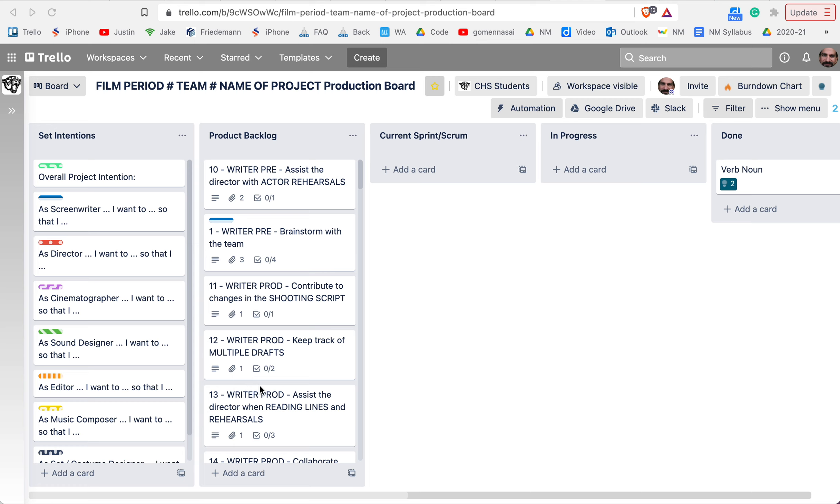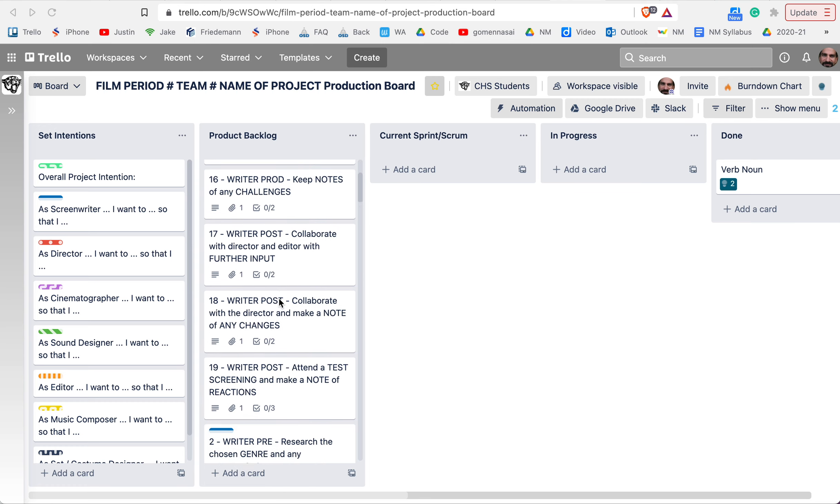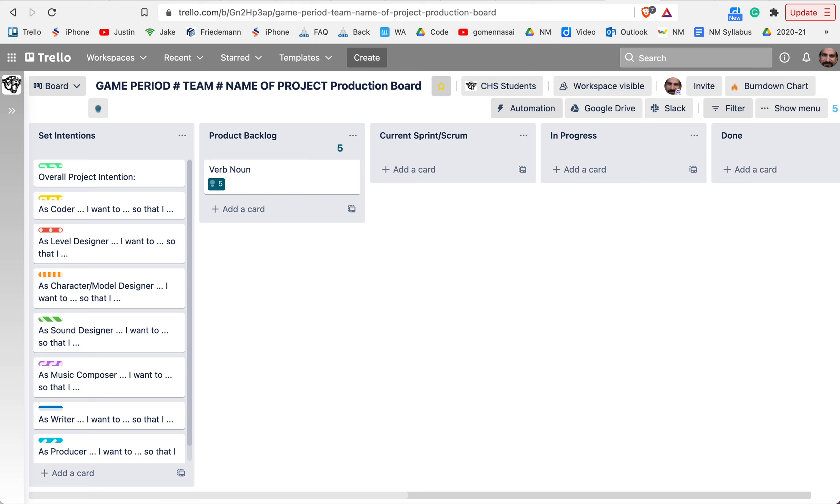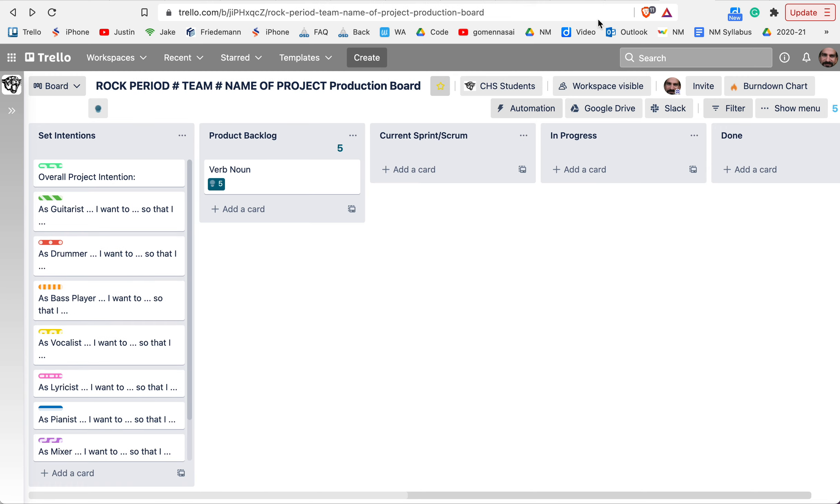This is the film board, and the film class has pre-built cards to help them understand what needs to get done to make a film. For other classes, we don't have that, so you put all your tasks into your backlog. Just a reminder that the backlog is where you put everything the team is going to attempt to do during the current sprint or scrum.